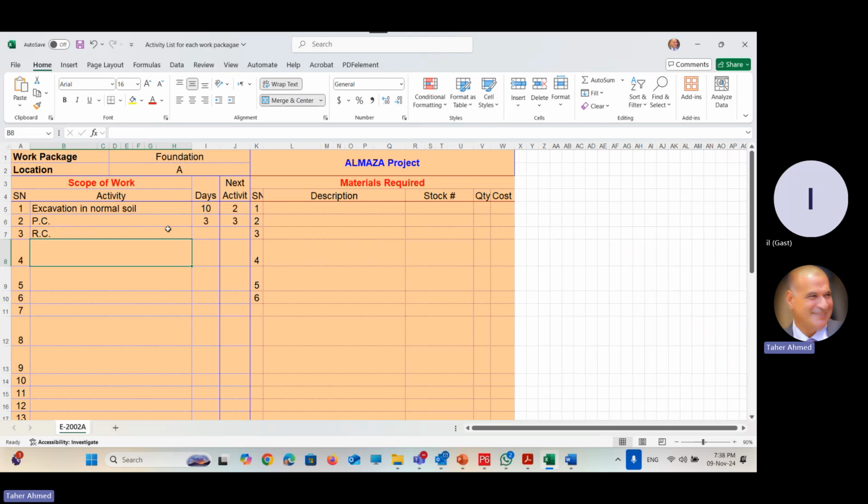Here it is. This is what I said, your homework. You have to create your homework, which represents what activities are needed to complete your package, the relationship of each activity, what resource is needed for each activity, and the duration of each activity. Then, after completing this Excel sheet, send it to the planner. The planner will take these activities and put them in Primavera to represent the work done, and then connect the packages together. This is the responsibility of the project manager and the planner as well. Each one is responsible for his own package and gives a relation for his package.